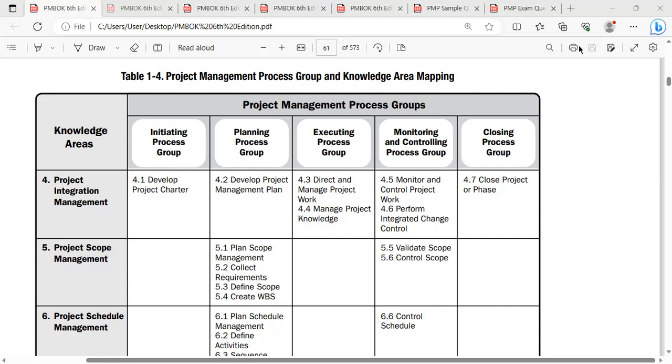So you need to have the complete stakeholder list that is very specific to that particular phase. You need to have the complete stakeholder information in the stakeholder register, and you are not able to keep that as a static document until you finalize your last activity for a particular phase, or the last phase of your project, or the last iteration of your project. Make sure that you iterate and update your stakeholder register, because it is a document where you know very well that many people will come inside and many people will be moving outside. So you can't keep the stakeholder register as a static document. You need to keep on updating it.